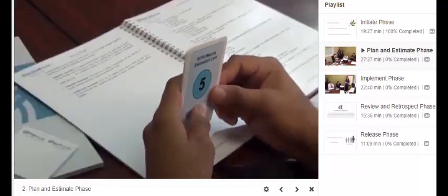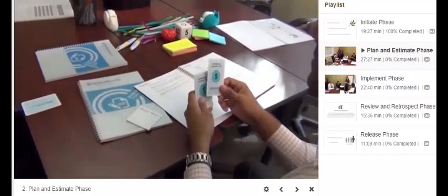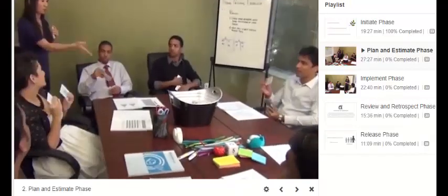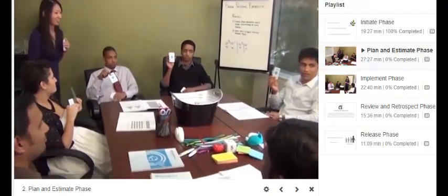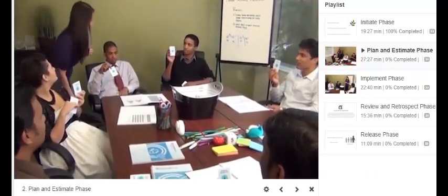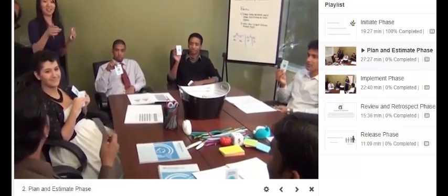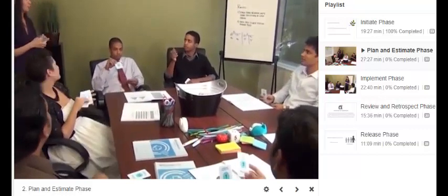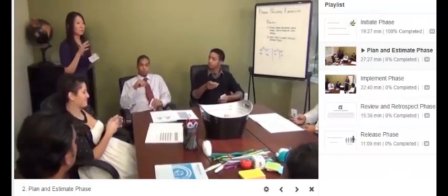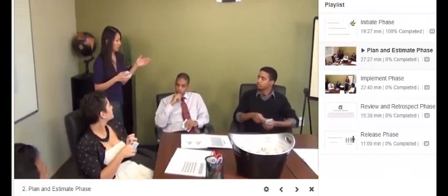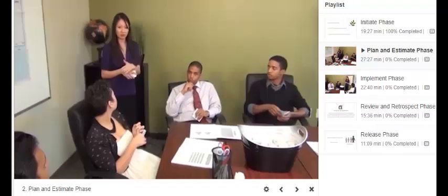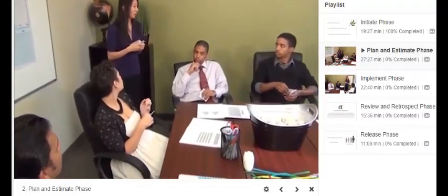Okay. And then the idea is you all show it at the same time. Ready, set, go. Okay, so I get 13, 8, 5, 8, 8, 5. Okay, and you got 13. All right, so the way this works is that the people who had the highest estimate and the people who had the lowest estimate explain why they chose that.